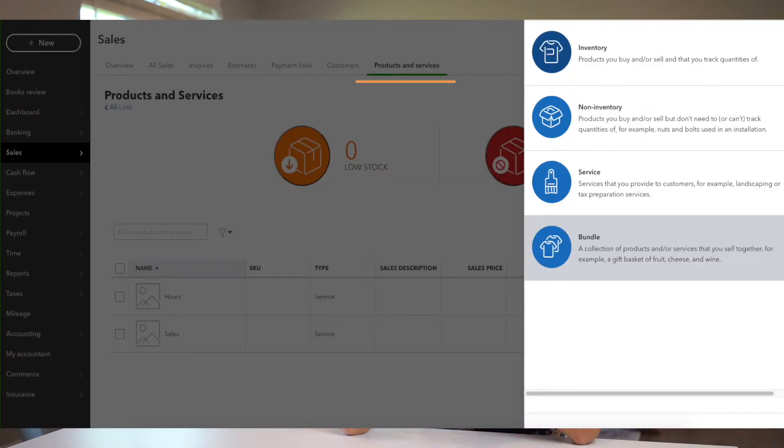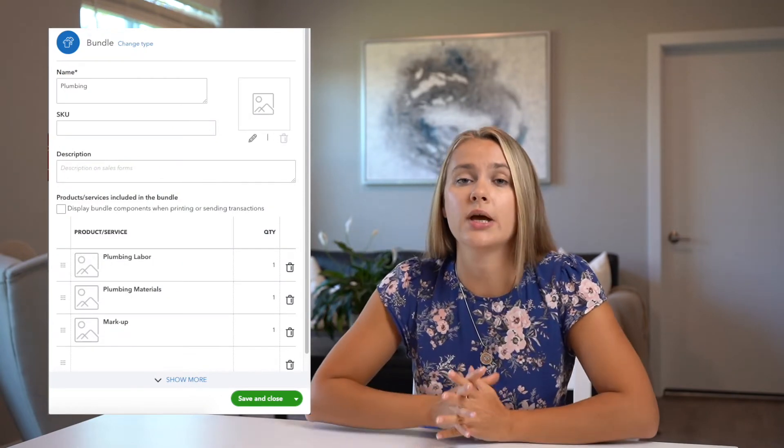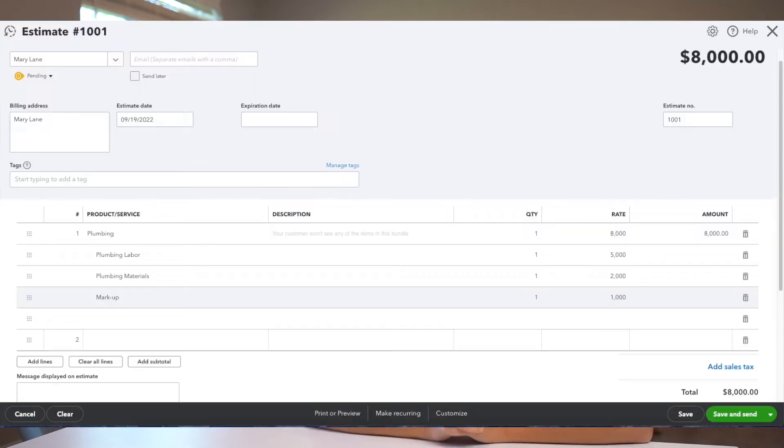You would create all the services you use — for example, plumbing labor, plumbing subcontractors, and plumbing materials — and then create a separate product called 'markup.' Make sure every single service and product is assigned to the right sales and cost categories. After that, create a Bundle — call it 'Plumbing' — and include all those services. Then when creating a new estimate, pick those bundles and fill out the amounts for each section including the markup, and the total will show up in the same estimate.